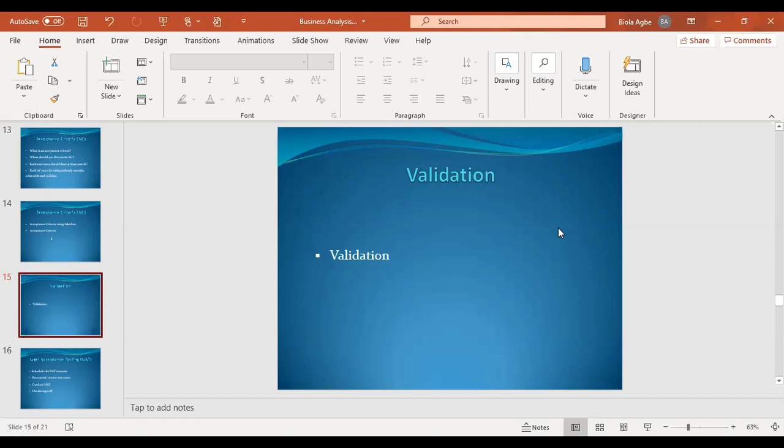Oh, sorry, I've just identified another gap here, could you please add it. As they keep making changes, the version keeps increasing, even to 0.11, 0.12, until they're happy with the documents. Then they say, yeah, it looks okay now, I'm happy to provide sign off for you.